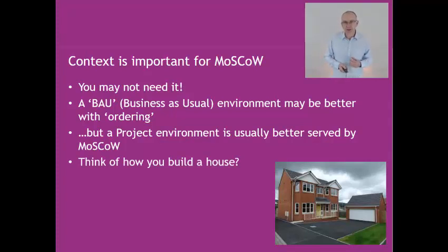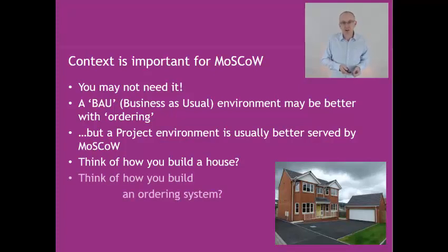Think about how you build a house. So if you build the kitchen and then you build the lounge and then you build the bedrooms, you don't do all the most important things first. So it's not a question of the most important thing is the roof, so let's build the roof. You do things in a sequence. And it may be that when you're doing the kitchen, you are building features for the kitchen that are not must-haves. Yet you haven't even started working on the lounge yet, where there'll be must-haves there. So one of the common misconceptions with MoSCoW is that you do all the musts first, but the truth is you don't. But if you're trying to hit a deadline, if you're trying to get to a certain endpoint, then MoSCoW allows you to keep moving and keep hitting these interim deliverables so that you don't spend too much time on the kitchen and too much time on the lounge. You can keep moving on and staying on track.